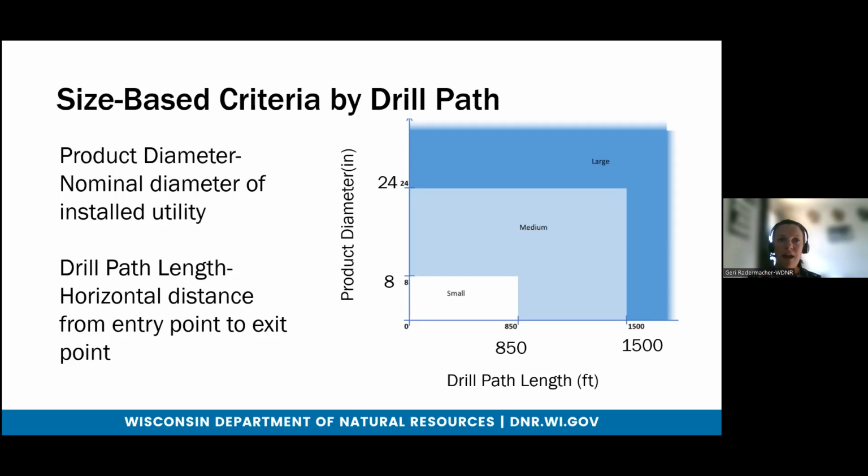And as Amy said earlier, even though we have the size-based criteria, those service laterals that are less than 6 inches in diameter and less than 200 feet long, the tech standard doesn't apply to those cases.